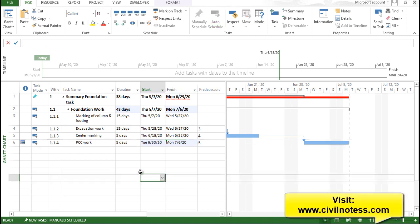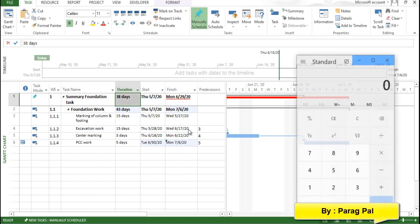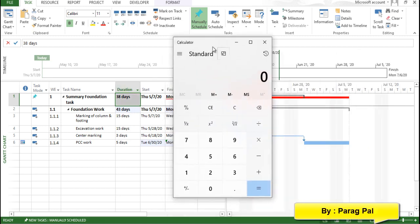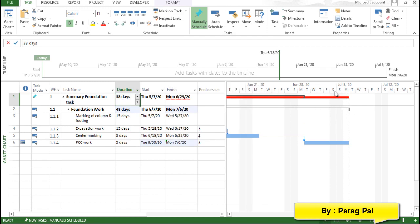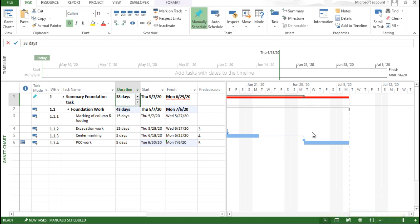Now you can see here also one important thing if you notice when I click on the start and finish date it will never change. But make sure that this duration will constant as it is what you place earlier. So with the help of that you can identify the differences. Like if I go to the calculator, I select here 43 minus of 38 it means you are exceeded five days. And this particular calendar consists Saturday and Sunday as a weekend. It means one two three four and five days you are exceeded your work. So whatever cost for one single day you need to multiply by the five. So you will get the cost overrun and five duration is your time duration.